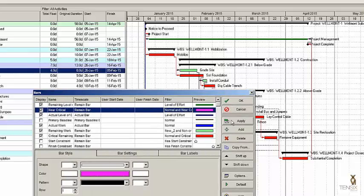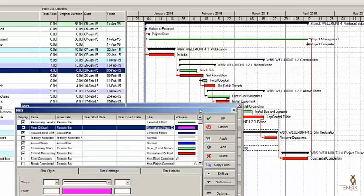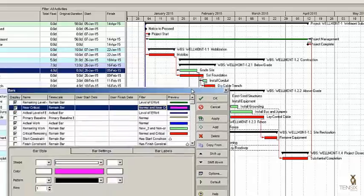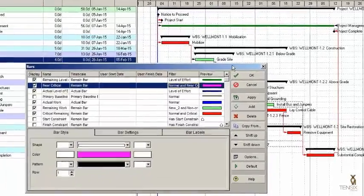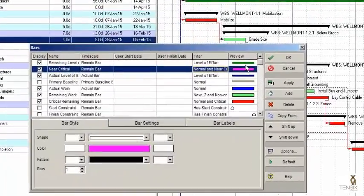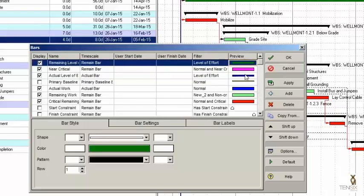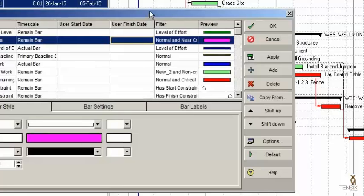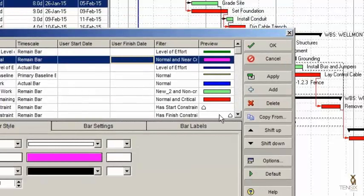If I hit Apply, notice you don't see any magenta bars — it doesn't appear. Well, there is a method to this dialog and you've got to view the bars here as a stack of bars. Where you are in the stack, either high or low, makes a difference. The clue is the shift up and shift down arrows you see here. Our problem is our near critical bar is too high up in the stack.